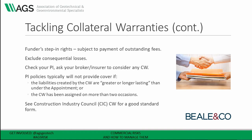An overriding point is that it's essential to check that any collateral warranty you agree to is covered by your professional indemnity insurance. PI policies typically will not provide cover if you are committed to any greater liability than under your appointment, or if the collateral warranty has been assigned on more than two occasions. Some insurance policies contain additional specific restrictions on the scope of cover applicable to collateral warranties or third party rights. It's always a good idea to ask your insurer or broker to consider any collateral warranty you're going to be asked to sign, and to confirm whether there are any uninsured losses.